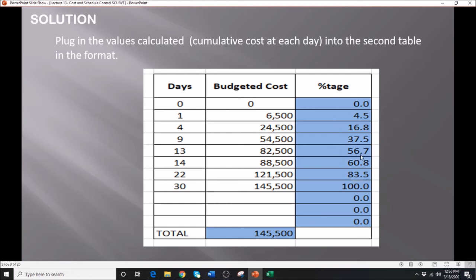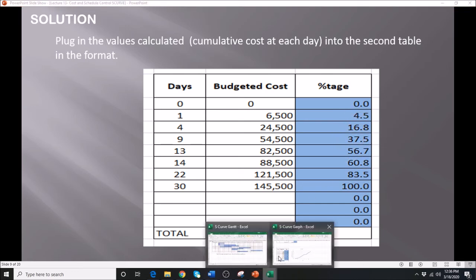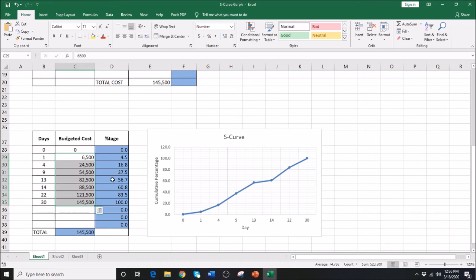If you have values that are decreasing or erratic, you messed up; go back to your calculation and find which part, because this one is cumulative. They should all be increasing. Is that clear?